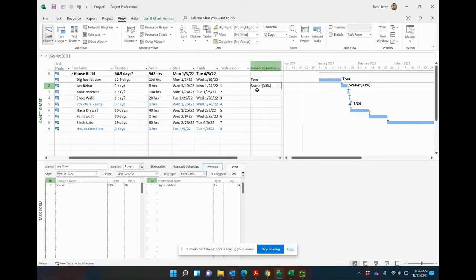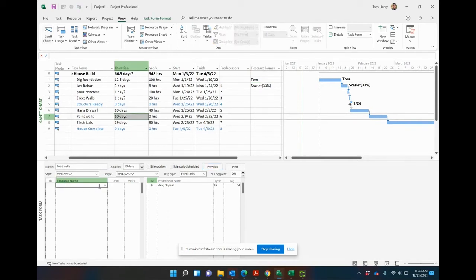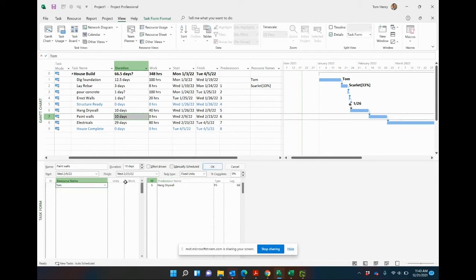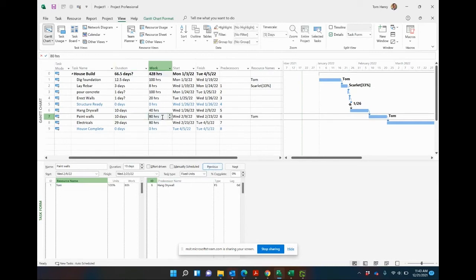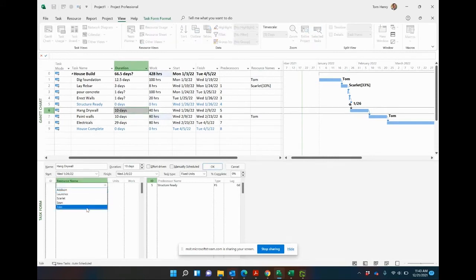Let's take another example of this. Paint walls, we have not estimated a work effort for this one. So when I assign a resource to this one here, let's put Tom on that one. By default it's going to be 100 units, full time. Boom. 80 hours, full time, 80 hours, two weeks, 40 hours a week. Do the same thing for hang drywall, put Tom on there as well.